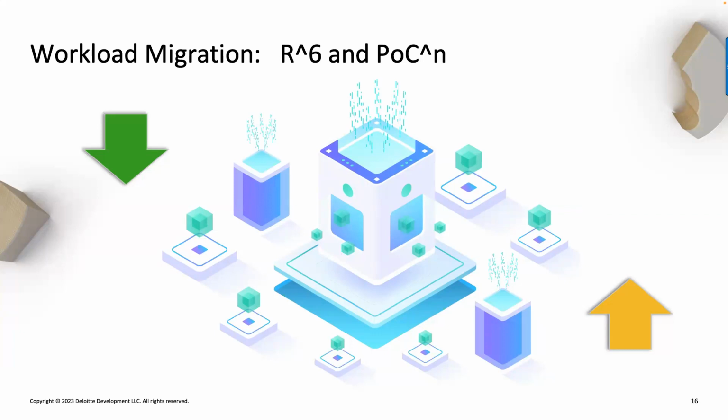Or sometimes the rehost people look at it and say, lift and shift, just lift it and shift it and move it to the cloud very quickly, right? In certain instances where you have GCVE, that's VMware on the cloud, there's an option for Microsoft and Google and others. Yeah, that's an easy part. It requires some network extension at the L2 level, and then you can move them quickly. But these are the minority out there, right? The majority of us will not go and do that.